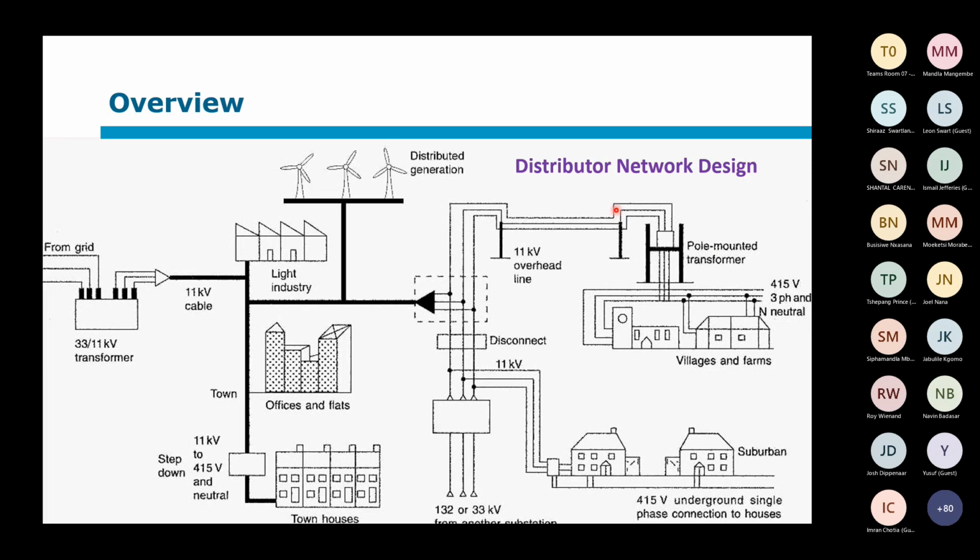We've now seen from the grid impact study and the grid strengthening study that we need another transformer and 2 more sections of lines. Now, planning can do that easily. The next step is to get the network to be designed. In parallel with this, we are going to get the generator plant design. So your generator now has to design all of their plant. These 2 would happen in parallel, have few touch points, but there's very little interaction really at this point.